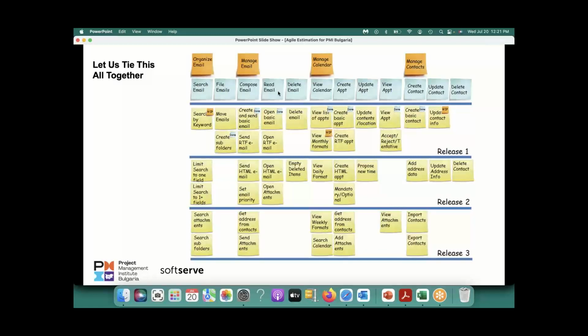Now, this is product level planning or affinity estimation. Now, when you go down to release planning, you need user story points. For each one of them, you need to know story points, because then you know whether you will be able to fit in this release. If it is a 3-month release, there are going to be 6 sprints, whether you'll be able to fit or not. Okay. So that is why it is important to do the story points.